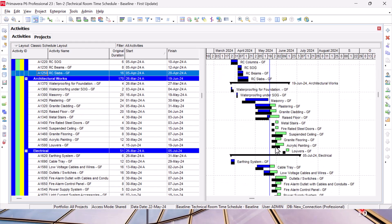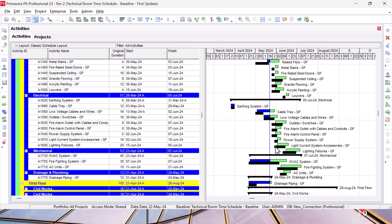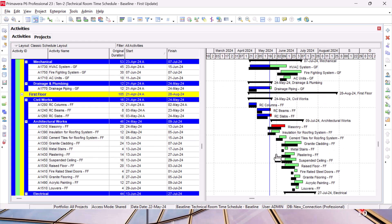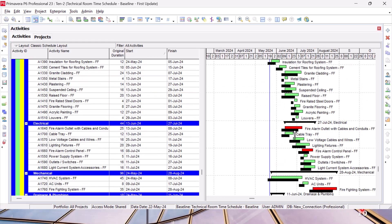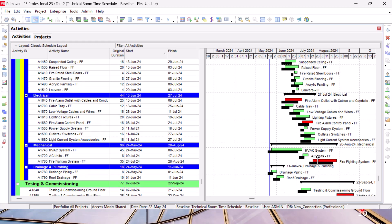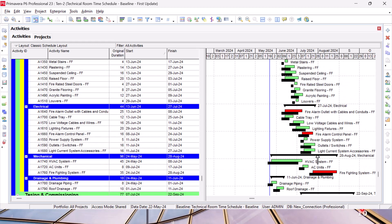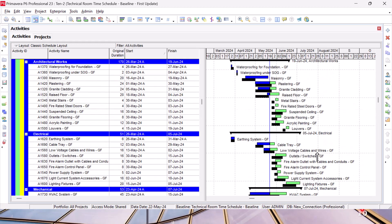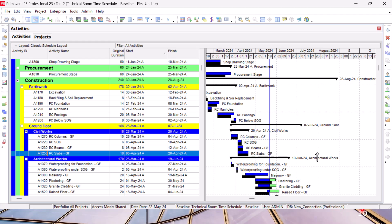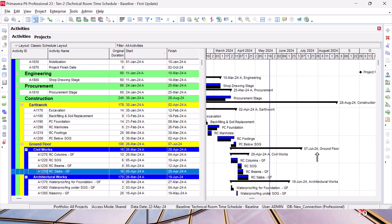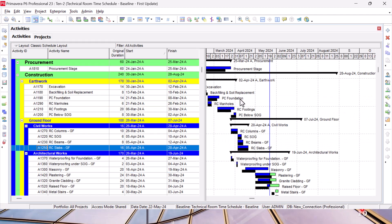I have now all the schedule. I can see that this activity is critical - the masonry in the first floor because it is red. I can see this fire alarm activity is critical. So now I can say and tell my project team what is going on by doing these simple steps.